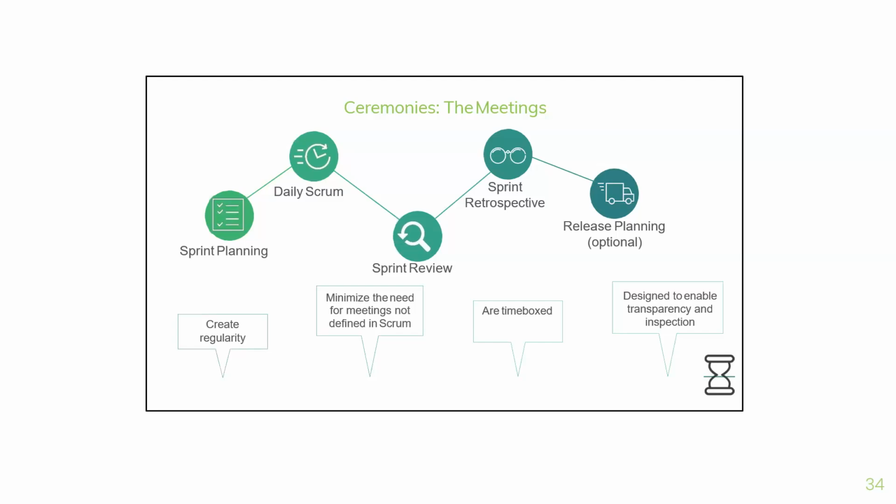So your daily Scrum basically is, maybe I've given Tommy a task and I'm saying, Tommy, what's the update on the task? It typically follows a particular pattern, and that pattern is: what did you do yesterday, what are you planning to do today, and what are the impediments or the blockers that are stopping you from doing those tasks, right?